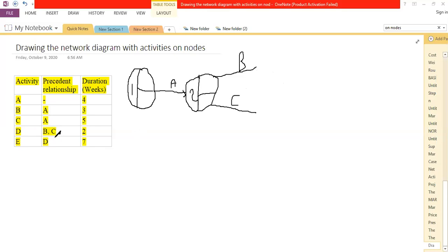Because neither B nor C is becoming a predecessor of other activities all alone, the dummy can go whichever direction you want. You can point the dummy towards C or towards B, since, I repeat, C and B themselves alone are not becoming predecessors of another activity thereafter.